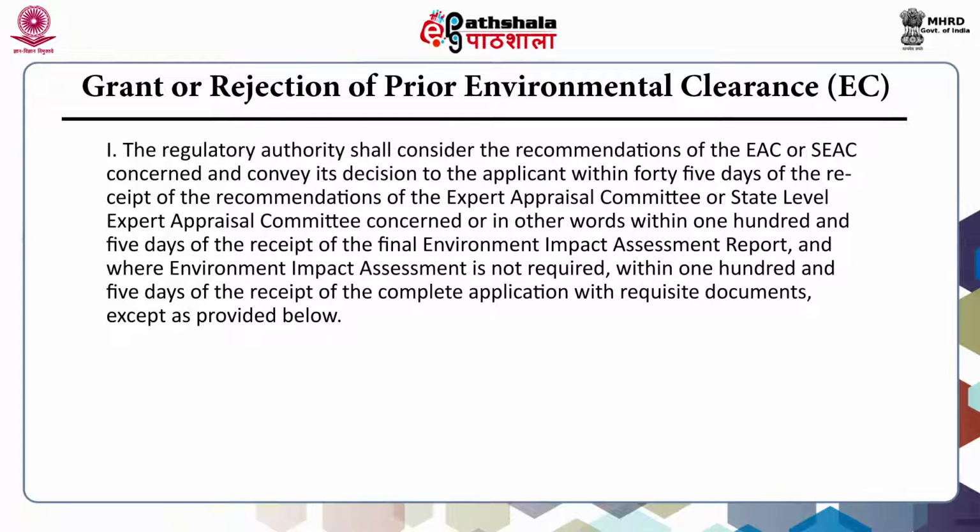The regulatory authority shall consider the recommendations of the EAC or SEAC concerned and convey its decision to the applicant within 45 days of the receipt of the recommendations of the expert appraisal committee or state level expert appraisal committee concerned, or in other words within 105 days of the receipt of the final environment impact assessment report, and where environment impact assessment is not required, within 105 days of the receipt of complete application with requisite documents.